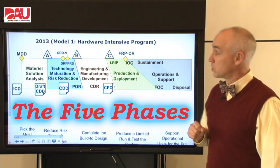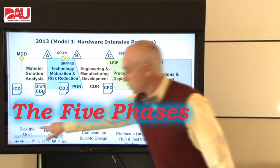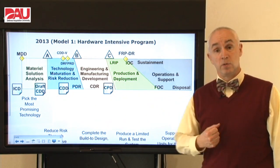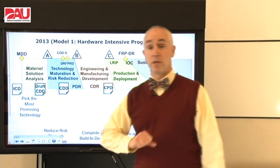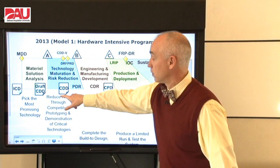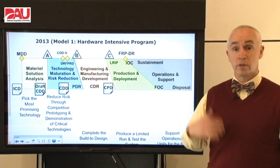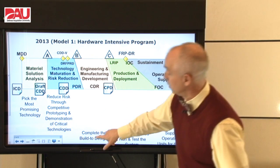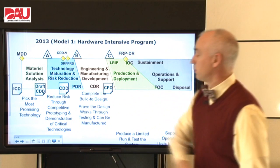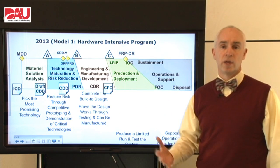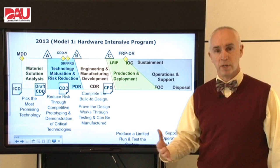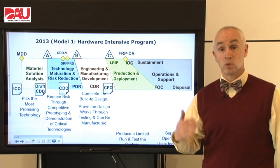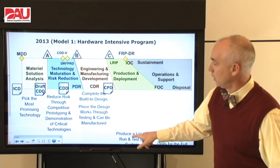These are the five phases. We start with Material Solution Analysis, which means we're picking the most promising technology to meet the user need expressed in the initial capabilities document. Then, in Technology Maturation and Risk Reduction, we're going to reduce risk by proving that technology through competitive prototyping, making sure that it works. Then, in Engineering and Manufacturing Development, we're going to complete the build-to design — the one that we're actually going to field — and build a few of those to prove that the design works and that we can actually produce it.